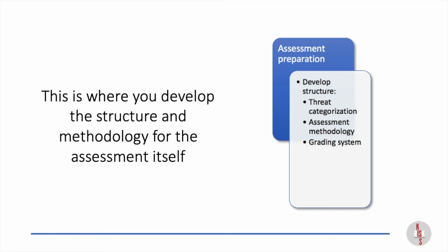So I know everyone is keen to jump into the actual assessment and start putting in the gradings and things, but we need to understand what structure we are going to use and what methodology we are going to use first. Now, it could be that this is a structure that the organization uses as a standard, in which case you should follow that. It could be that you're going to adopt an international standard or an international guideline or some form of guideline that's provided by your industry. If none of those things are in place, you may need to develop your own.